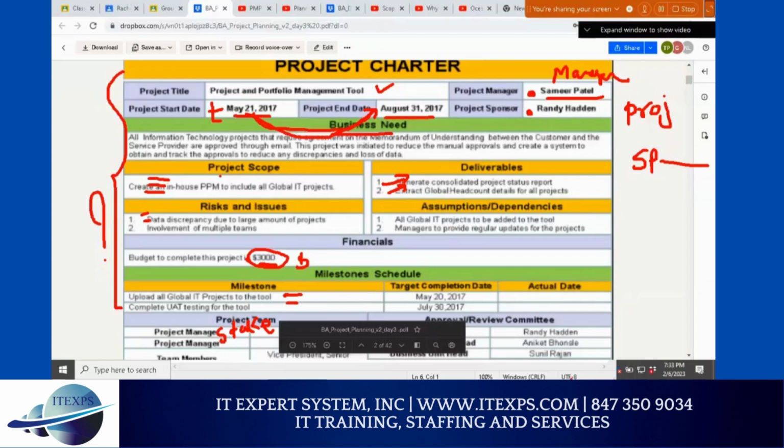So this is your starting point. But when you join, you want to reconfirm that. Is this right? If it is not right, and you get an opportunity, make sure you adjust it. Make sure you make the necessary improvement or correction. Because what if 3 months have passed since the person prepared it? Now needs might have changed, scope might have changed, deliverables might have changed. In that case, risk, everything will change. It's a good idea to revise this document and make sure it remains a working document, because there are certain things that will force your timeline, and certain things that will force your cost also.